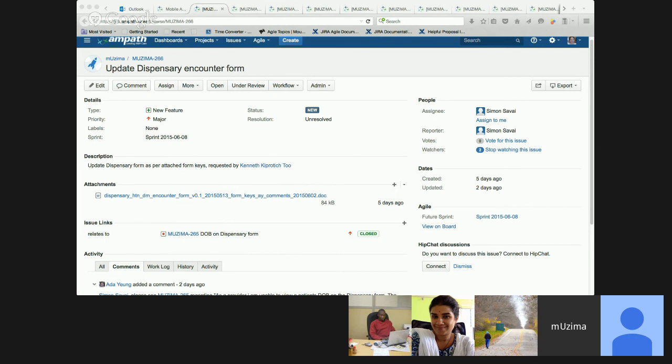Yeah, it does make sense. So for the developers who are assigned to the tickets, I think you just need to be firm, saying that I'm going to start working on this ticket now, and any new requirements would require new tickets, and that's it. Then we'll just go based on the specs on this particular ticket and do the development work.